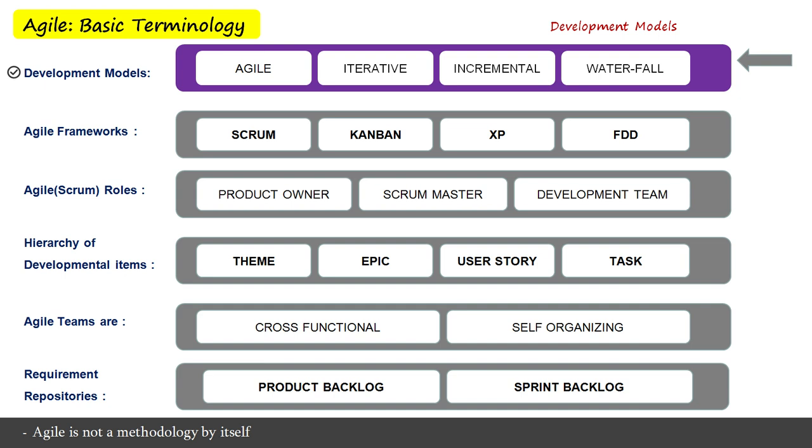Incremental delivery is when the team is able to take small parts of the business or the development and deliver them as small incremental work. The functionalities of the product or application service are built gradually, in a step-by-step process. Incremental development is when each successive version of the product is usable and each one is built upon the previous version.